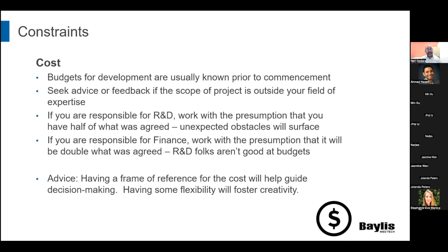Conversely, if you're in finance and the R&D folks tell you, hey, look, it's only going to cost $1 million to do it, you better go find 2 million because of the same reasons. So just some tips from the field there.